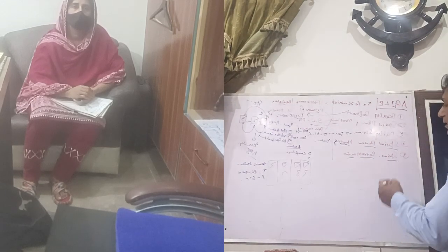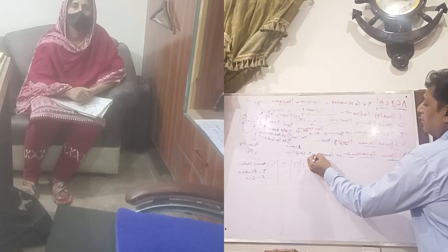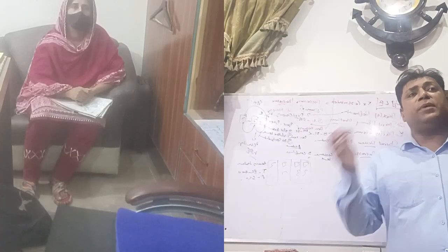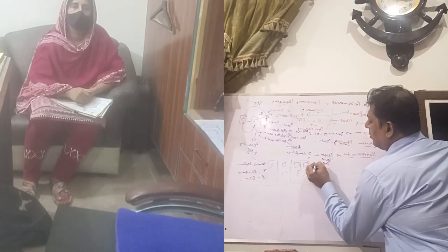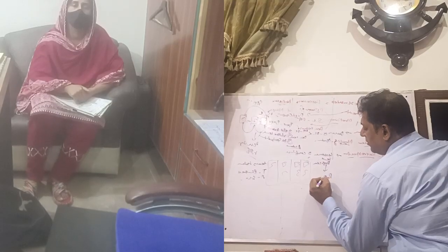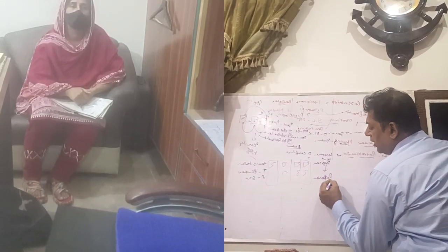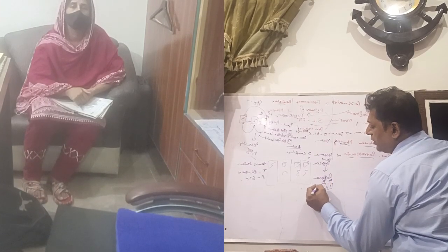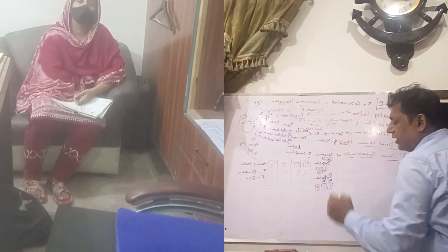Right. The last one is the sprint retrospective, which is basically the same as lessons learned. In the predictive way of project management, they used to be called the lessons learned register, which will ultimately go to a lessons learned repository, which is like a graveyard of lessons learned from project 1, for example, project 2, project 3. The lessons learned register is for one particular project that you finished.